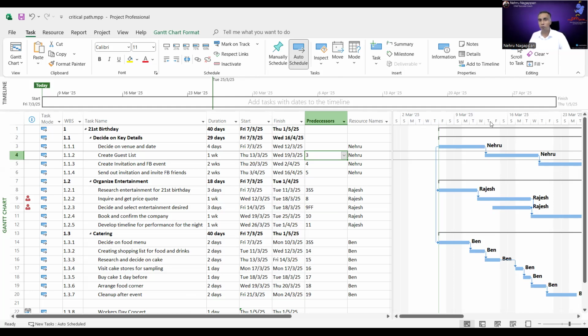Delay the activity or postpone the activity. So let's say he comes back on Monday. How many days are we going to postpone? It's going to be Thursday, Friday. 2 days I'm going to postpone. Don't include the Saturday, Sunday because it's a weekend. It's a non-working day.